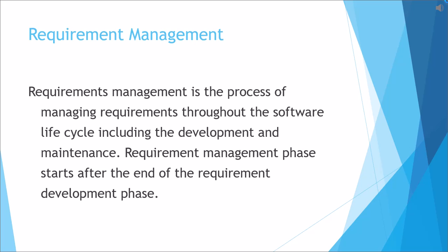So what is requirement management? Requirement management starts when requirement development ends. It is all about managing the requirements. When you have arrived at a set of requirements, what may happen later is that the customer might come back to you and say that this particular requirement needs some changes, or this requirement is no longer required and has to be deleted, or a few more requirements can come in at a later stage. Managing the changes in the requirement set and maintaining the proper versions of the requirements is all about requirement management.